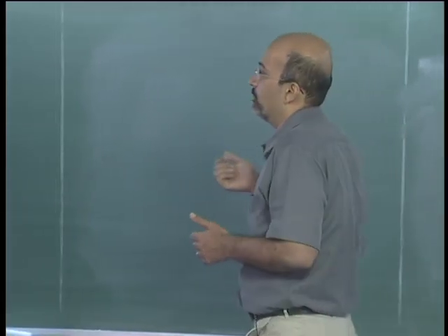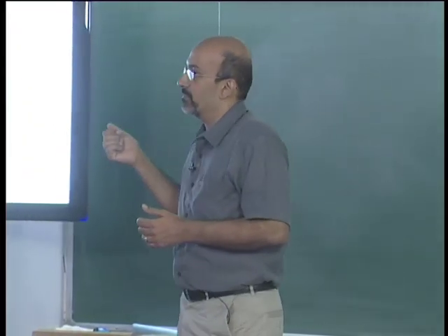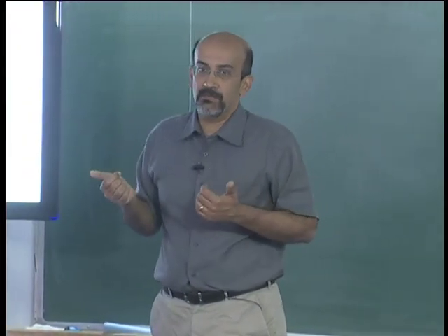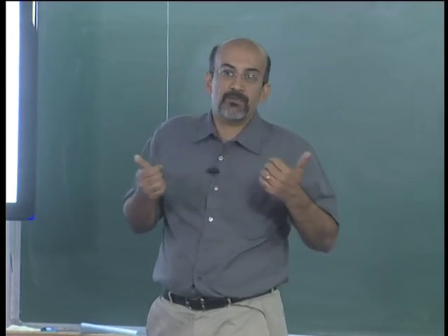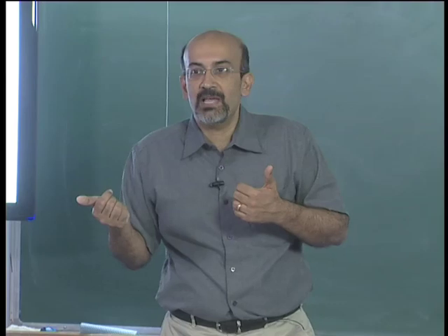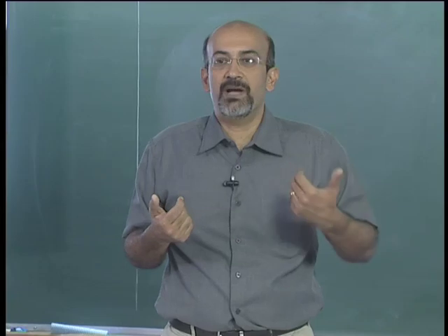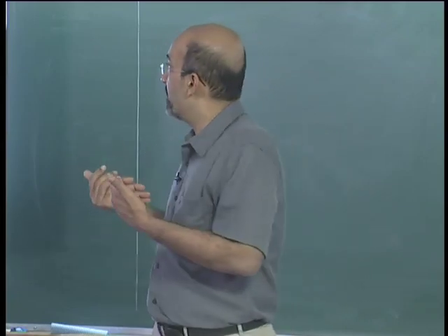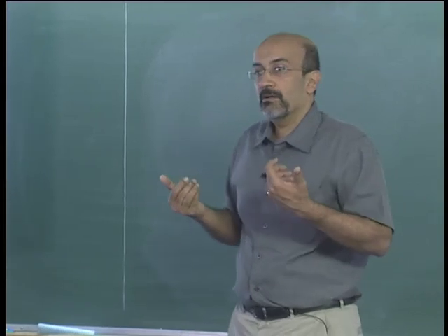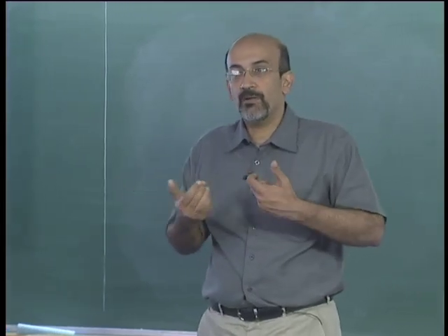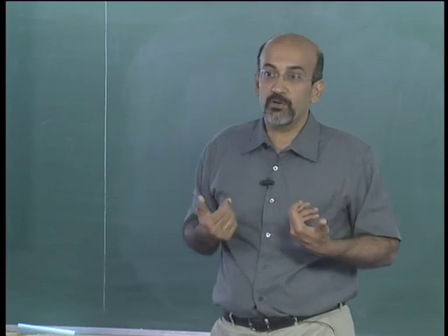For example, we might want a view from different subcontractors. All of concreting could be one subcontractor, which means the piling and the deck slab don't need different people, or I want the concreting view of the project, not the component view.